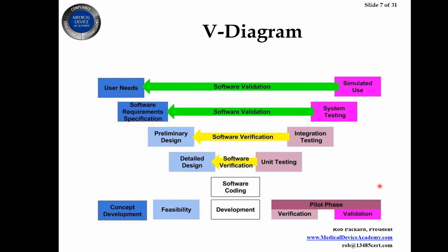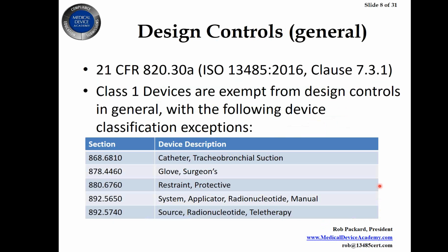You don't have to get caught up in following a diagram. You have to create a design plan and follow your design plan. And you can update that plan over time. You don't have to keep your Gantt chart forever and ever. It's a plan. Plans change. The thing is to document your plan and assess the impact of those changes to your plan.